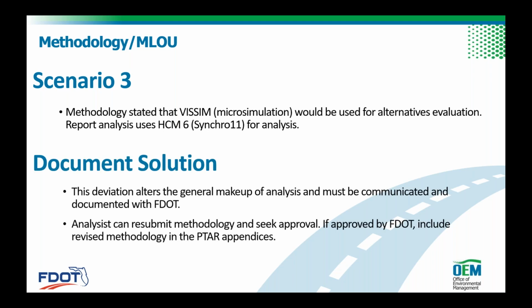So here, this is a complete deviation that alters the general makeup of the analysis approach and results, and must be communicated and documented with the reviewing agency, FDOT. In this scenario, the analyst can resubmit the methodology and seek approval. If approved by FDOT, include the revised methodology in the PTAR appendices. All right. At the end of the day, it's understood that you can't know all of the project elements before beginning the actual project analysis here in the methodology stage. So it is understood and expected that there will potentially be deviations from the methodology.